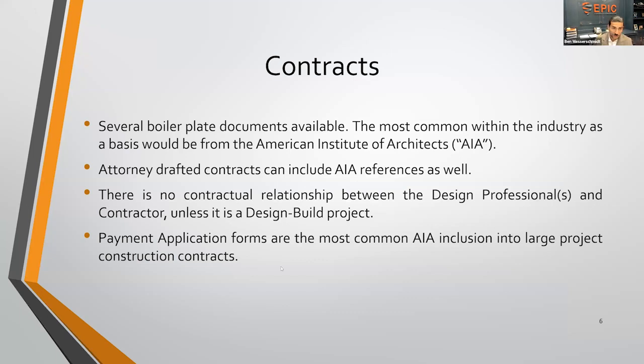Now, contracts. So moving over to contracts is going to be likely the second part of this equation as far as kicking off an overall project. You're expected to have a contract, obviously, with your designer, but you also have a contract with your contractor as well. And if you have an owner's rep involved, owner's rep as well. Now, it is very important, and I'm just jumping to the third bullet on here, to note that your design professionals, contractor, and if you had an owner's rep in this scenario, there's zero contractual relationship amongst those three. The only unifying